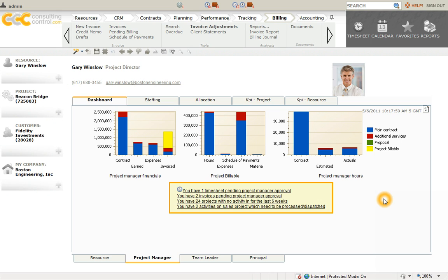We recommend that you involve project managers and team leaders in the review process as they know the most about the clients and the projects that you're working with each month. In this case, our project manager begins the review, and we've set a threshold within our system to alert and require our team leader's approval if the draft is adjusted by our project manager beyond a certain dollar amount.